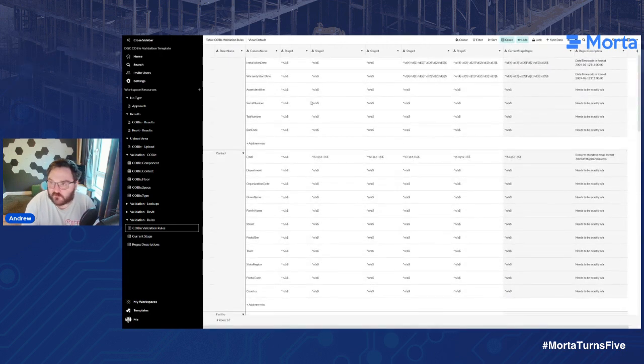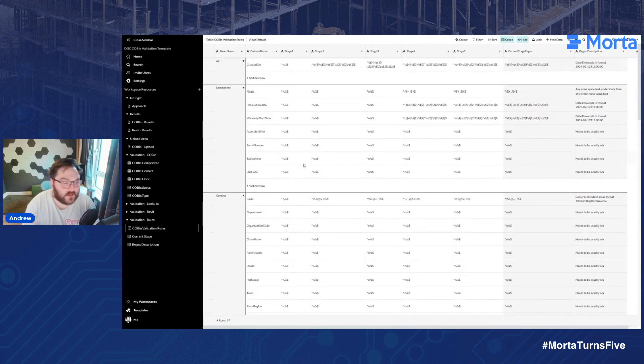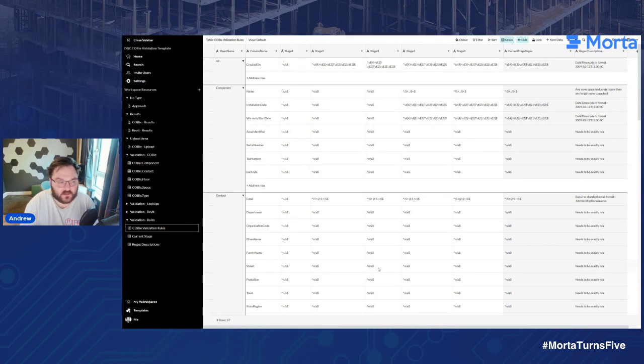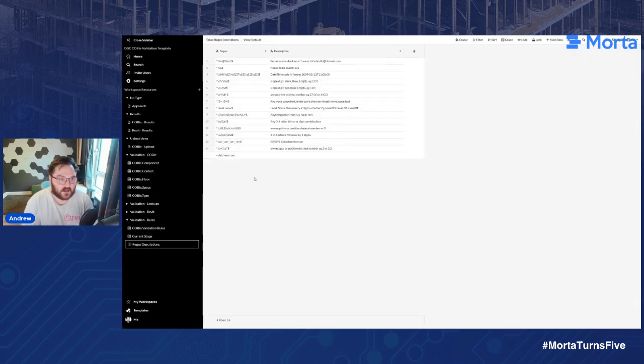We've got various regexes that we can check against various things. So we can actually quickly change what stage we're validating against by just changing stage 4 to stage 3, etc., or the other way around. But it also means that we're only validating the information we want to at a very specific stage as well. So all of this allows us to effectively generate a set of instructions and a set of criteria for validation upfront, and then everything is just automated from that.